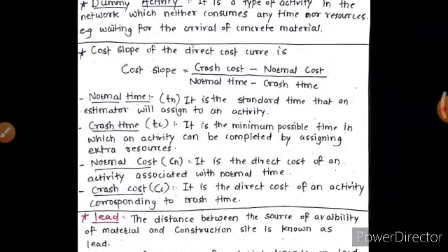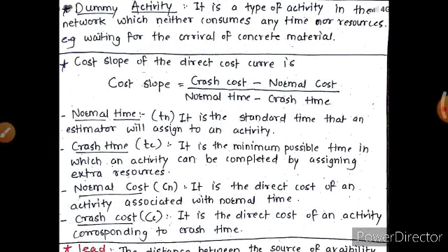Now the next one is dummy activity. An important terminology used and asked in SSC is dummy activity. It is a type of activity in the network which neither consumes any time nor resources, for example, waiting for the arrival of concrete material.